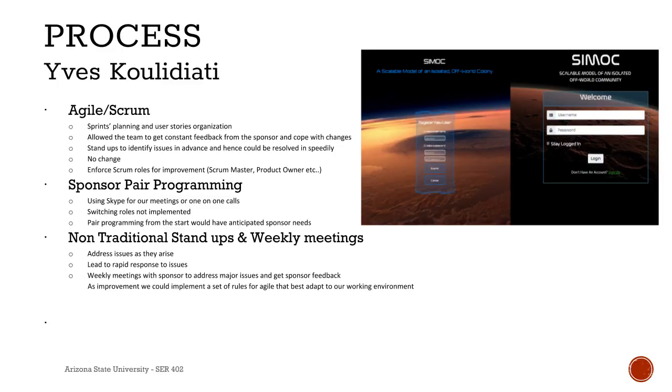Process: Agile Scrum. We decided on Agile initially to help organize the planning for our user stories and tasks. While we used Agile to track various tasks, we did not necessarily adhere to the standard plan of stand-ups during sprints. Typically, any issues or thoughts were discussed in real time via our Slack channel. In retrospect, one change that we would have made would have been better implementation tasks for user stories for better use of tracking tasks.